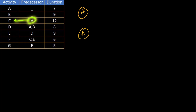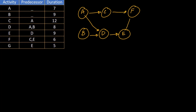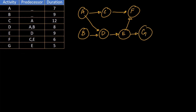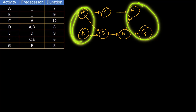After the completion of A, C starts. After the completion of both A and B, D starts. E starts with the completion of D. F starts after the completion of C and E. G is the final activity of the project and starts after the completion of E. So A and B are the two starting activities, and F and G are the ending activities of the project.